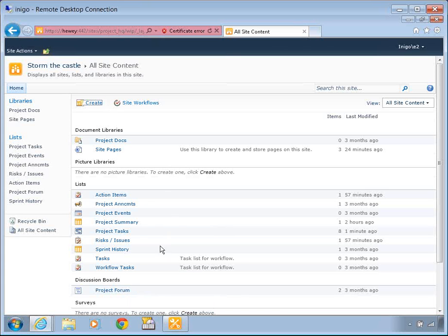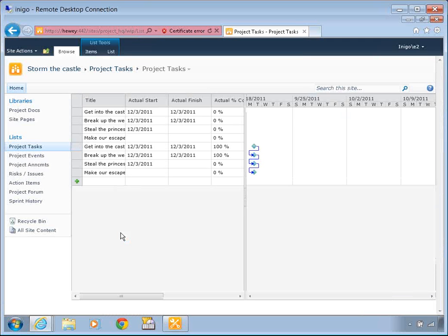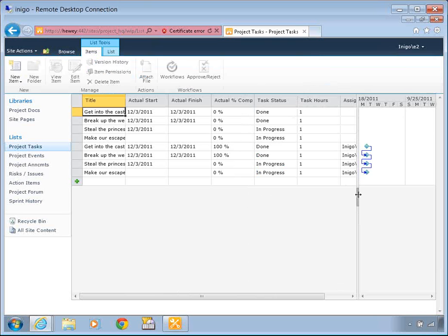The project tasks that we have listed here would need to roll up, for instance, percent complete, related to how many hours or how many points maybe in the Scrum scenario. You get a total for how many hours there are in the project, and then there would be a total for how many were done, total for how many were in progress, for how many were not started, and a different percent complete can be calculated from those.